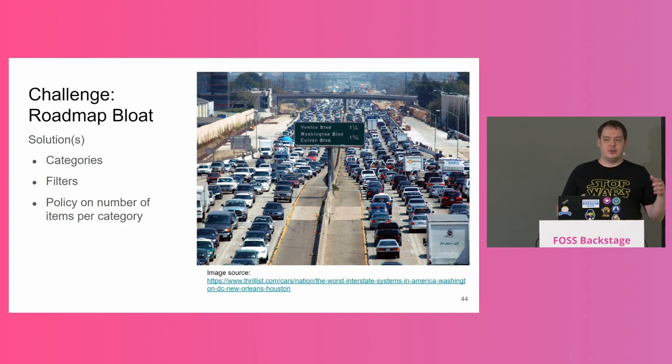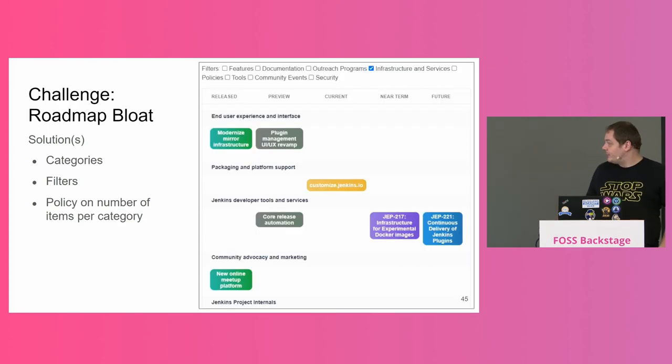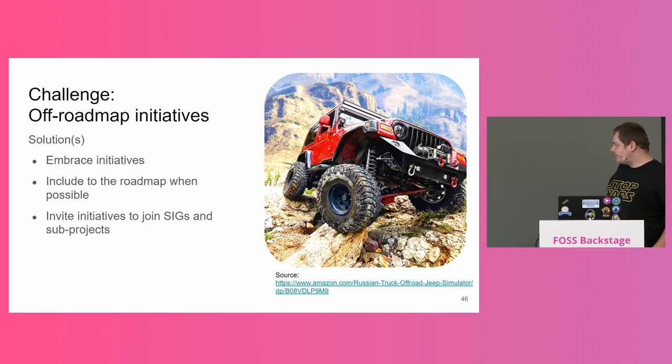Ideally, you would like to have a multi-level roadmap for a complex community, but there are no tools that easily allow doing that, unless you create multiple GitHub projects or various kinds of dashboards, which is probably what I would recommend. In our case, it was just a bunch of filters written in JavaScript, which kind of worked, but again, it defeated the initial purpose of having everything comprehensible on a single page.